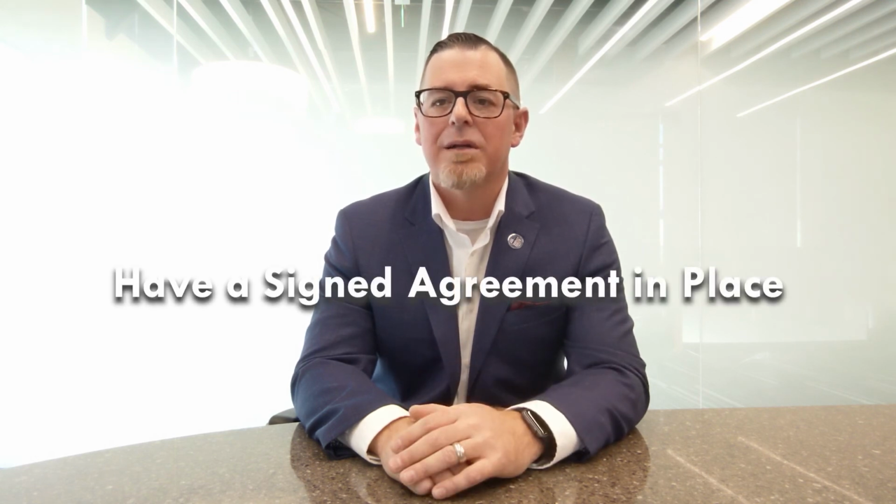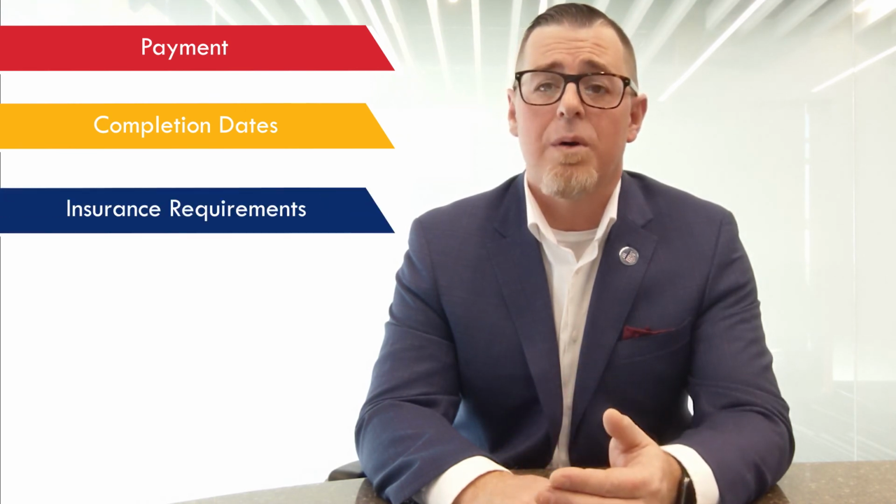Finally, have a signed agreement in place with the subcontractor that clearly outlines expectations as far as payment, completion dates of the project, insurance requirements, and site safety.